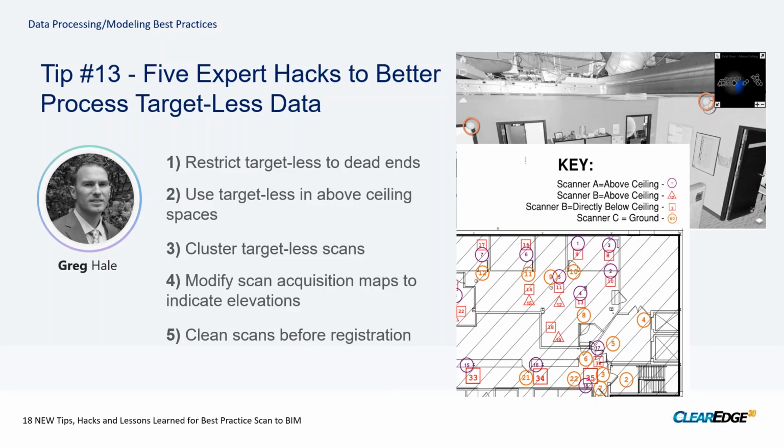For the scan plans, we simply use Bluebeam to create a few simple marks, and it has an automatic counting tool. For the scanners on this particular job, we used 3 scanners in tandem with each other. Essentially, one person doing more of a traditional architectural scan for the floor plan, establishing the baseline for everything to tie to.